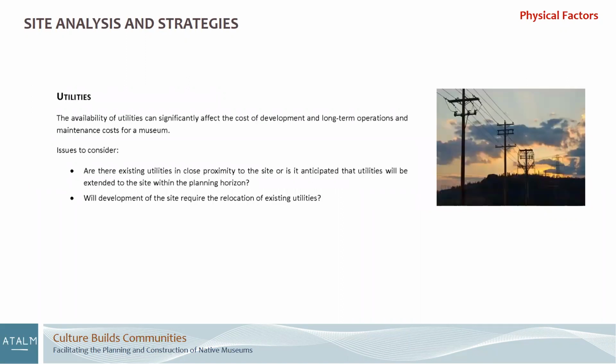And then utilities. Utilities are incredibly important for a site. Oftentimes in tribal development, there are greenfield sites that have no sewer, no electricity. So all of these things are major considerations for costing and determining the financial feasibility of a project. I had a project recently where they didn't realize that there wasn't enough water to the site, so they had to build a water tower for a couple million dollars, and so we had to shave money off of the project in different aspects just to make that work.